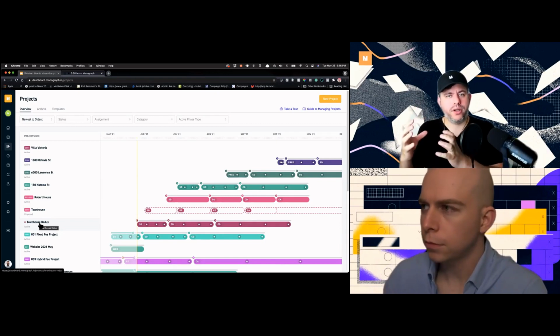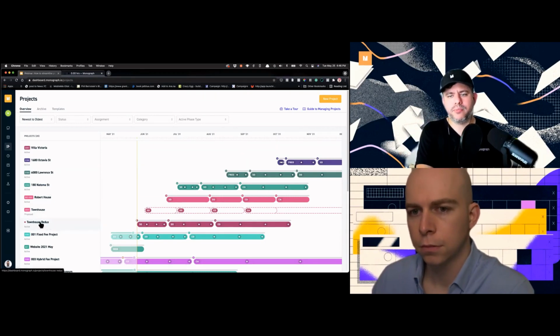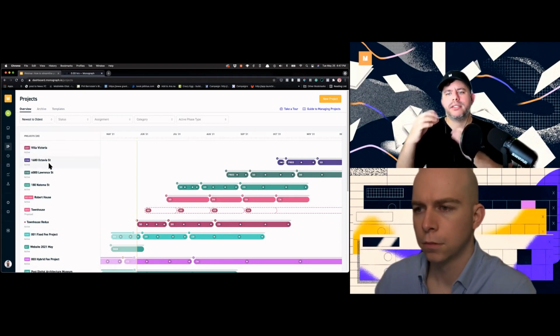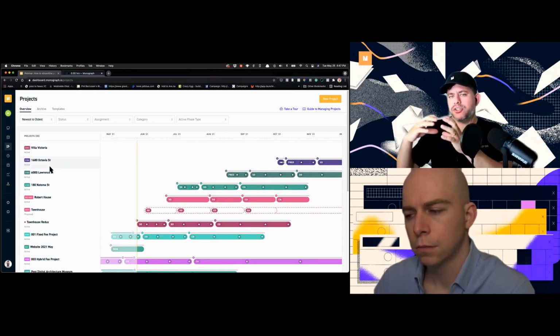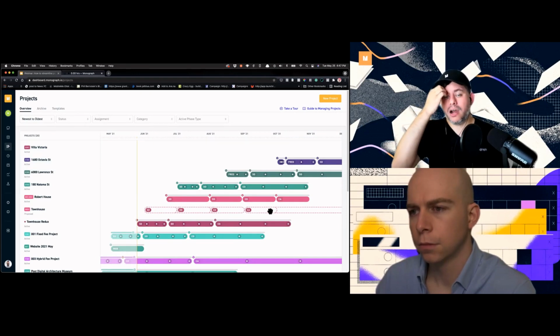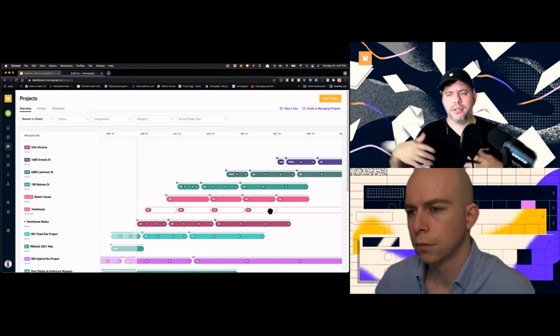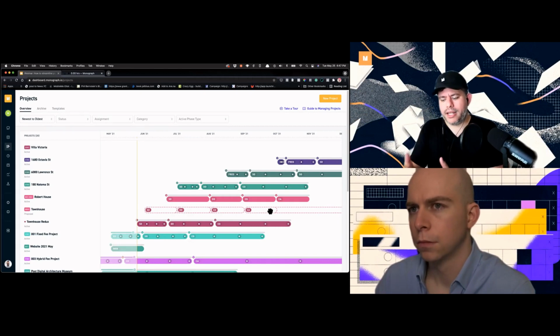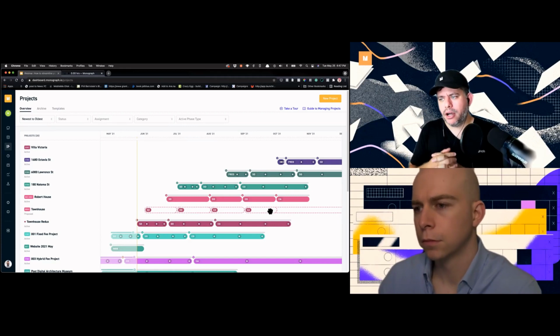One is through those categories that we talked about, where you can create a category for additional services. So you can basically create a distinct project, say like Townhouse Redux, as an example, a separate project that has as the entire phase the additional services phase that you saw we created in the settings field. So this whole thing would just be one phase that you can then bill against on either an hourly rate with a not to exceed cap, which you can increase over time. That way, if you already had a predetermined amount that you wanted to allocate for this, you could on that front.